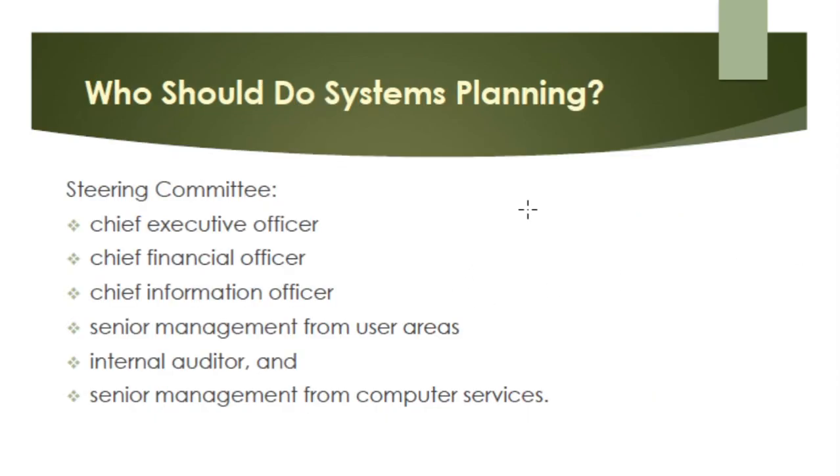So who should do systems planning? Now, most firms take systems planning seriously and establish a systems steering committee, which includes the following. So you have CEO, CFO, CIO, senior management, internal auditor, senior management from computer services. So these are the common members of your steering committee. Now, again, it will depend on the company on who are the people that they want to be involved in their steering committee. So the purpose of the steering committee is to provide guidance and review the status of systems projects.